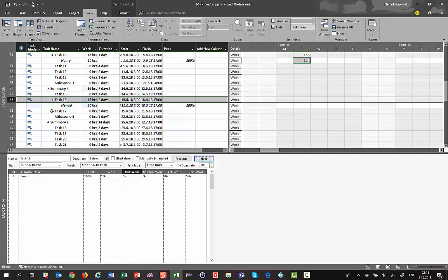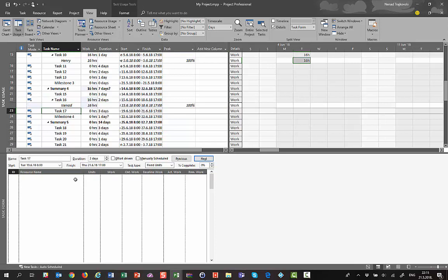I need this task, which is 3 days. I will put Nenad, and I will put, okay, this is 24 hours, 8 hours overtime work. You will see that this is 2 days, and if you go to this task, I will work 12 hours per day, because once again the calculation is made.